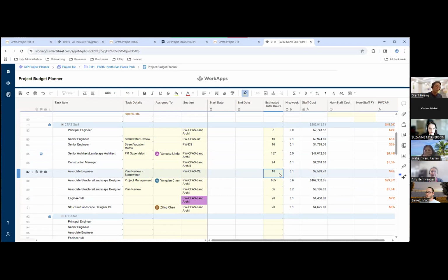In that case, if you want to rectify this item, you can go ahead and press 17, and essentially all the actual hours have been estimated. If you're still on an early construction document preparation phase of 60%, they're probably going to need more time. You originally estimated 10, maybe we'll need 40 just to account for future time as well.